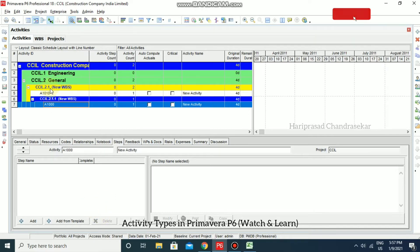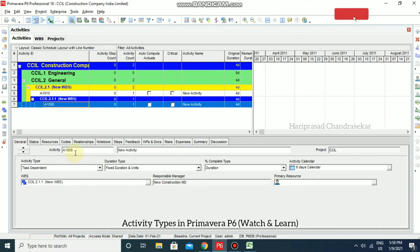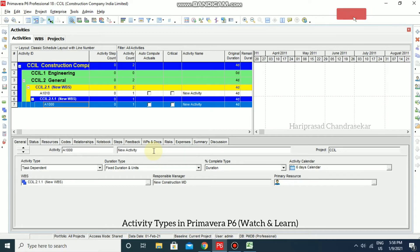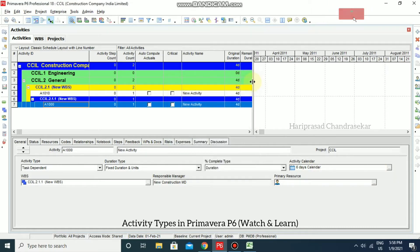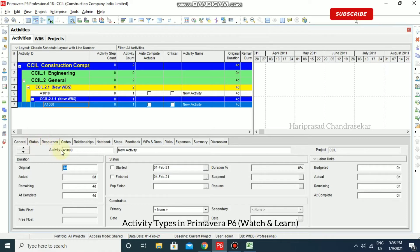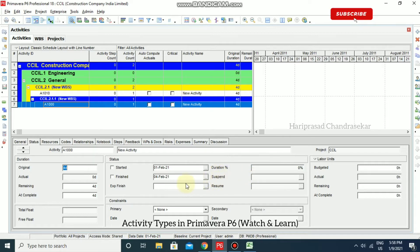In an activity, you can define an Activity ID and give it a name. This ID should be unique so you can identify and describe it easily at a later stage. You can also set an activity calendar, choosing it accordingly. Under Status, you can set activity start and end dates, and the percent complete — how much percentage of the activity is completed.